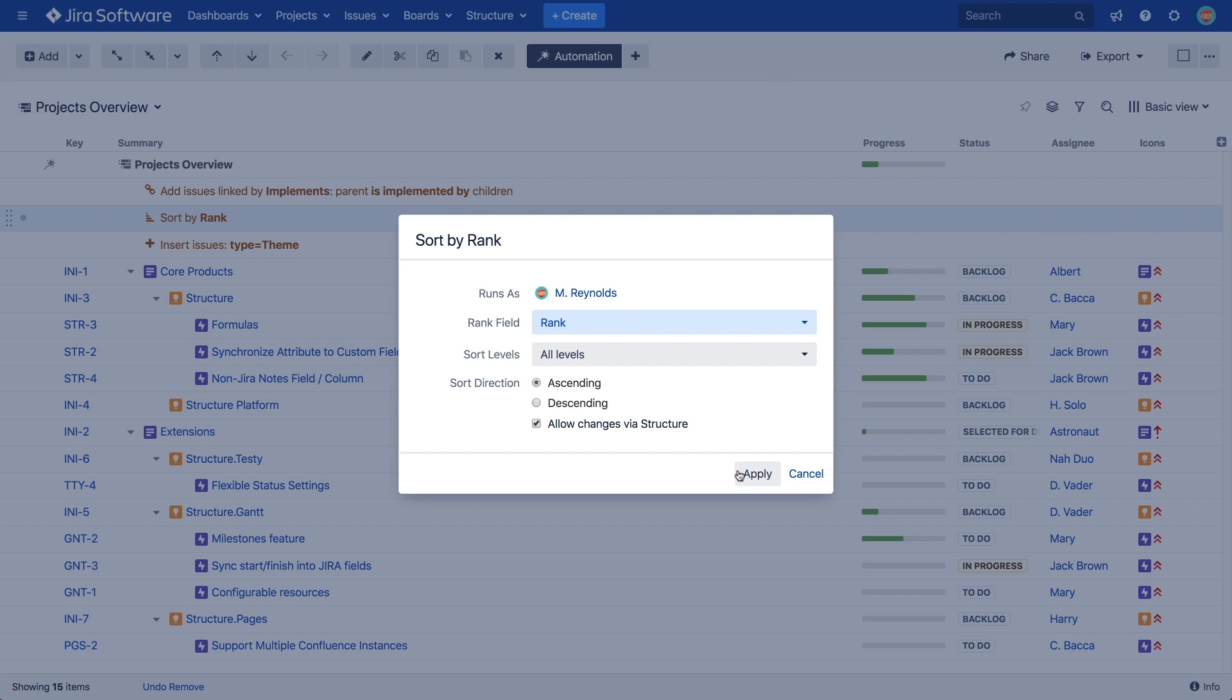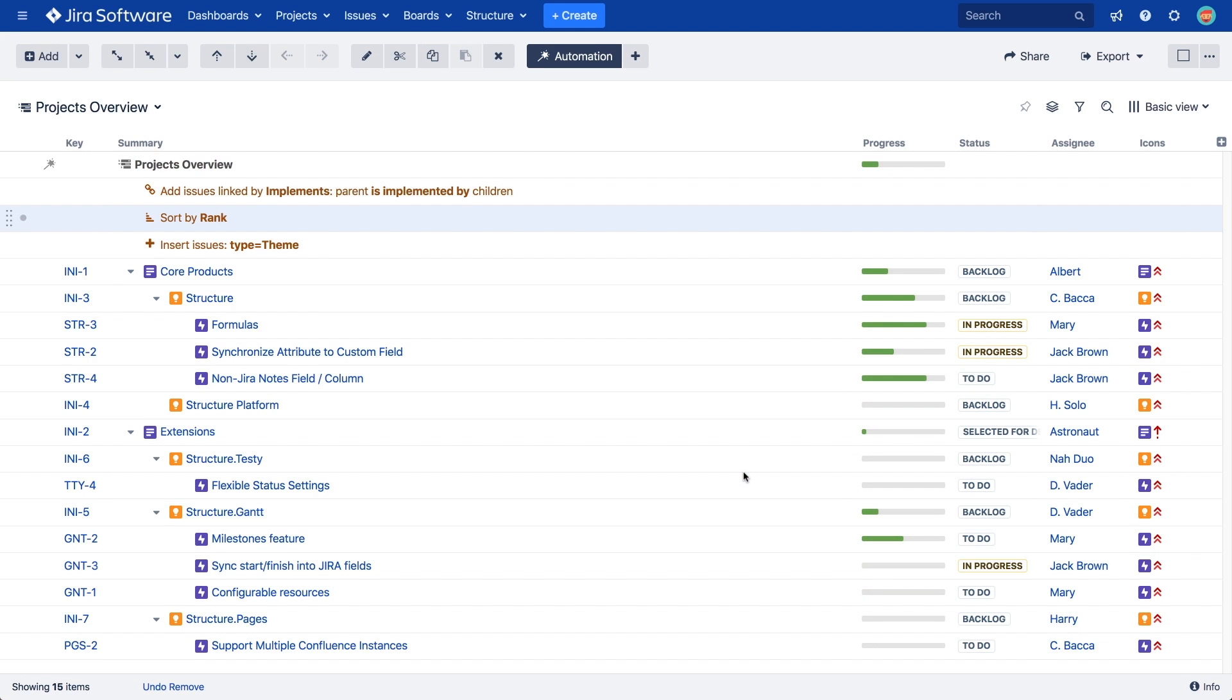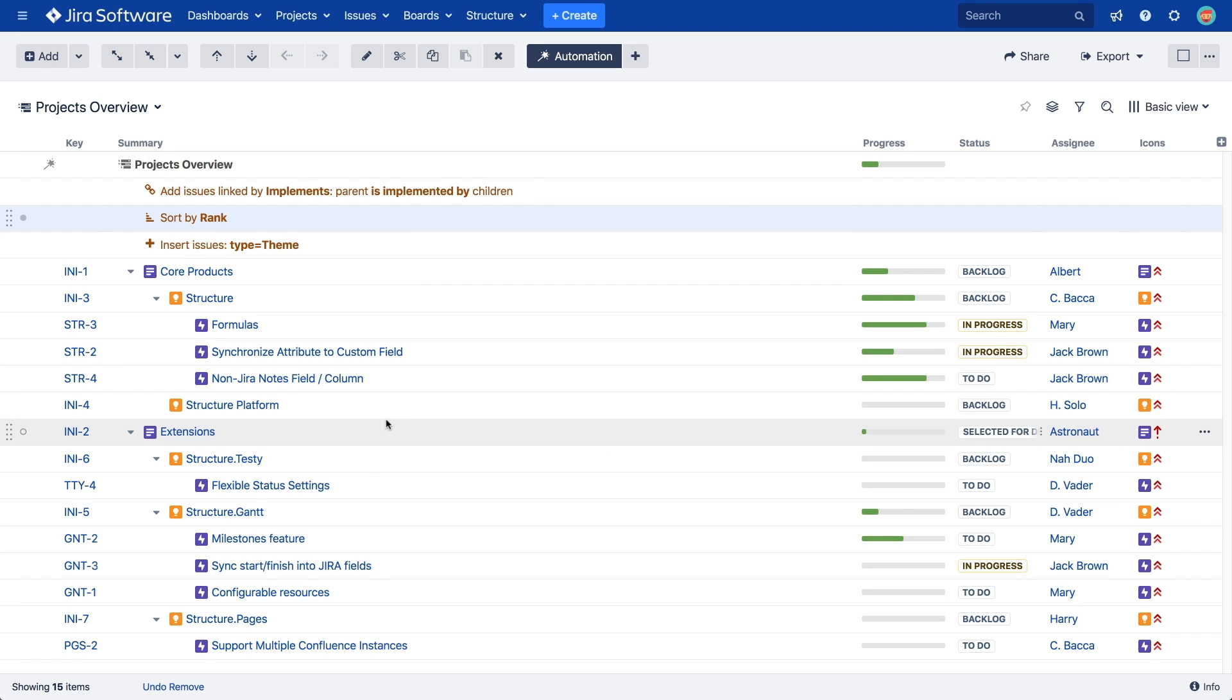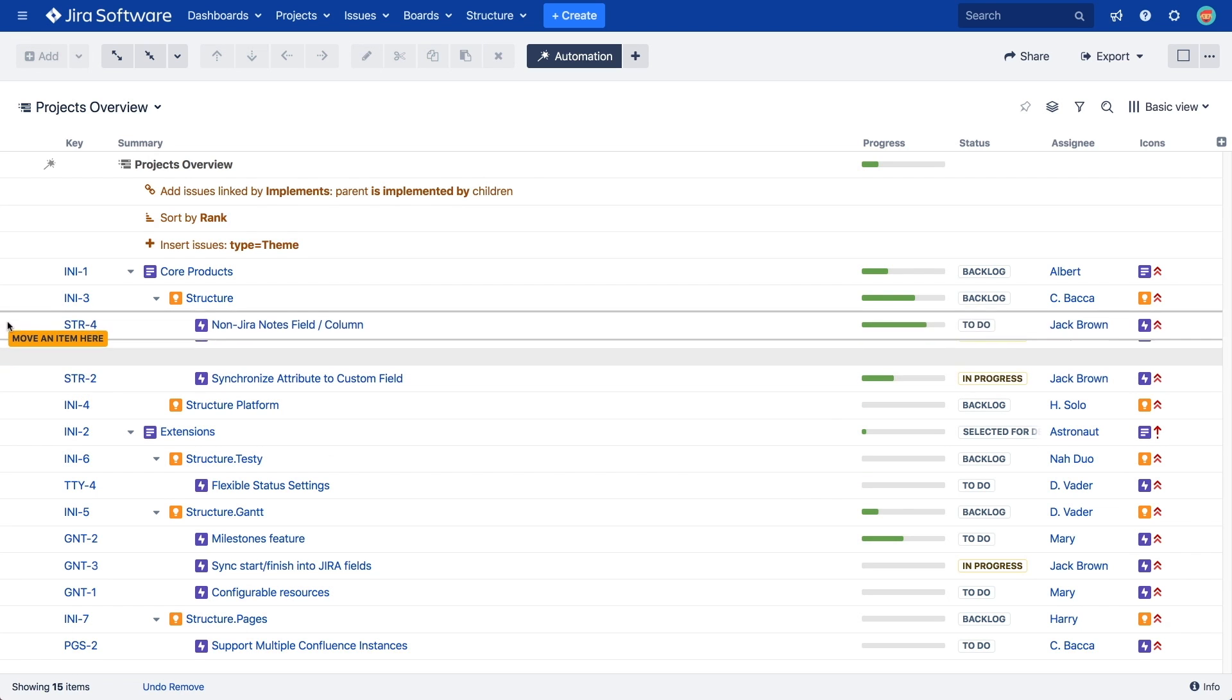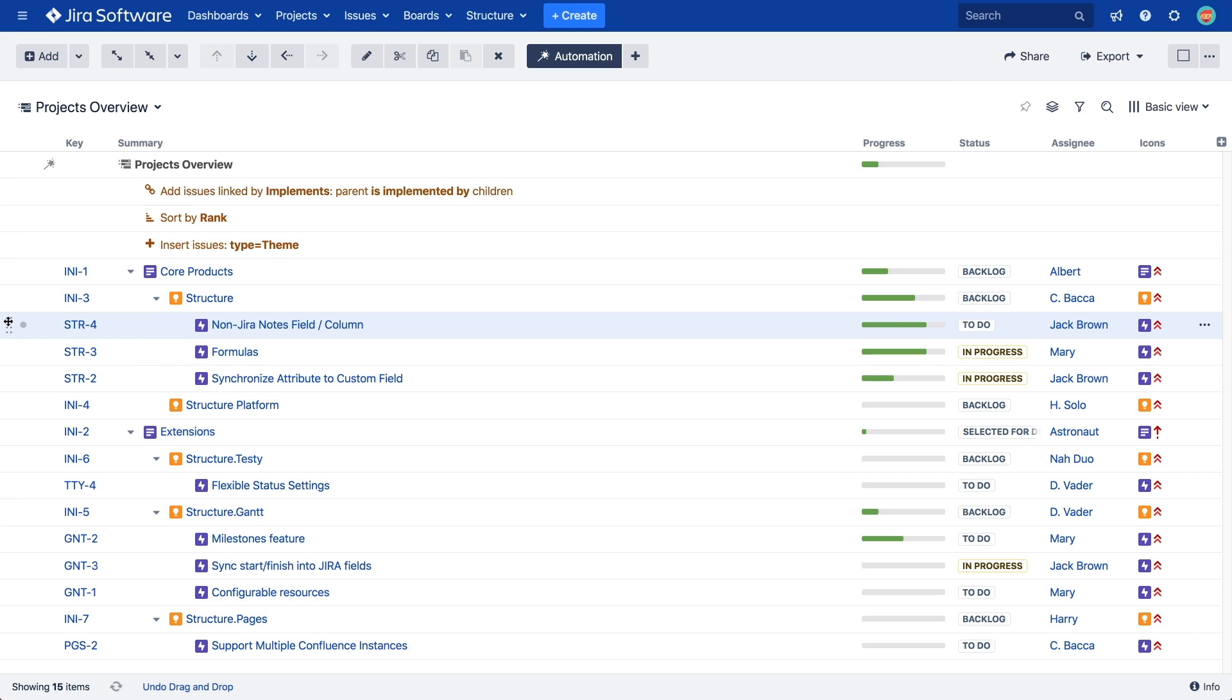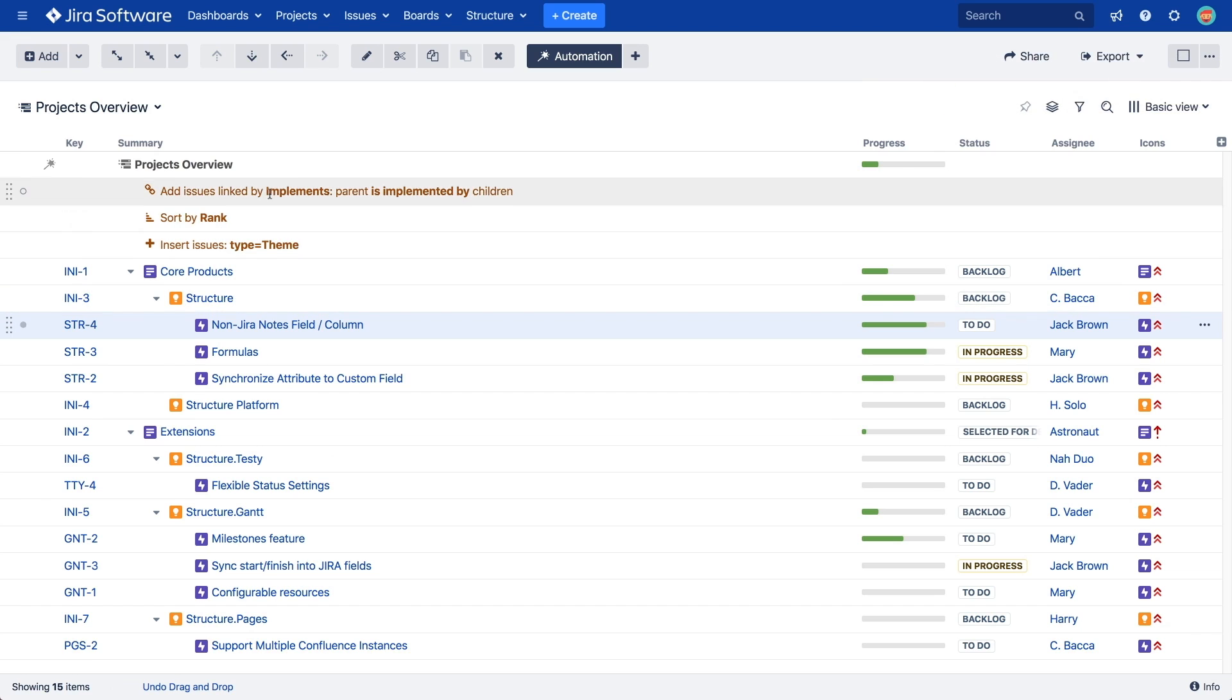If you sort by fields like Priority or Summary, reordering issues in Structure will not be possible. But, if you sort by JIRA software rank and have the Edit via Structure checkbox enabled, you can reorder issues in Structure and change their rank in JIRA. It's also possible to add multiple Sort Generators if you need to sort by additional fields.